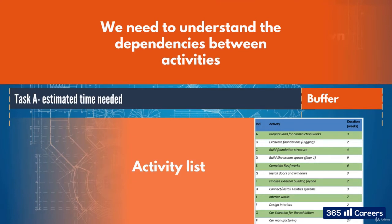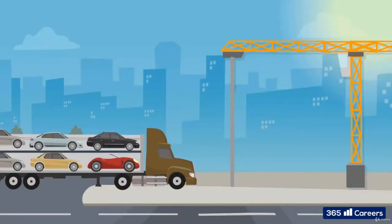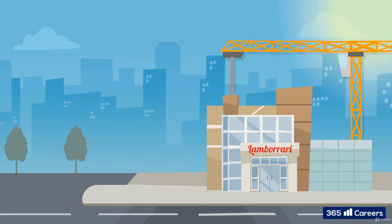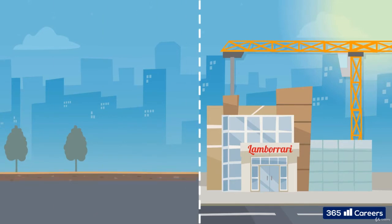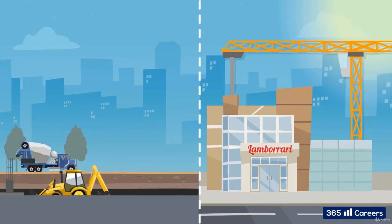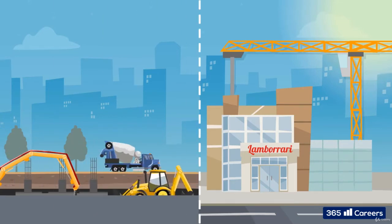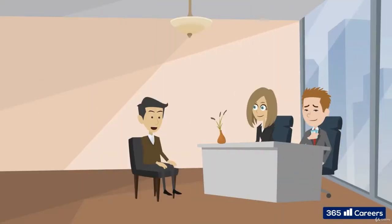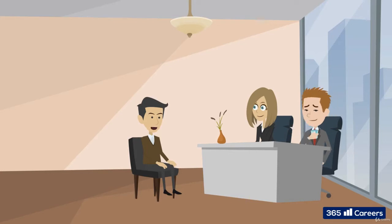It's not hard to imagine how some tasks are dependent on others. You can't have the cars delivered without a showroom, and you can't build your showroom until you've started digging, and you can't start digging until you have the machinery on site. You can, however, start recruiting the sales team. So let's look at the four main reasons why dependencies exist between tasks.